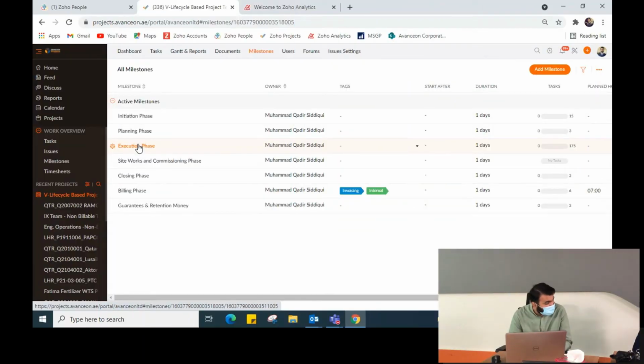Once your PM or team lead assigns you a task, you have to complete the task within the given time, and you need to log your hours. It is very important to log the hours, as if we want to calculate the productivity of each resource, we need some input data on what you are working on. If you are working on something and you are not logging your hours, then this will give a negative impact on your profile. So it is very important to log your hours on a timely basis.